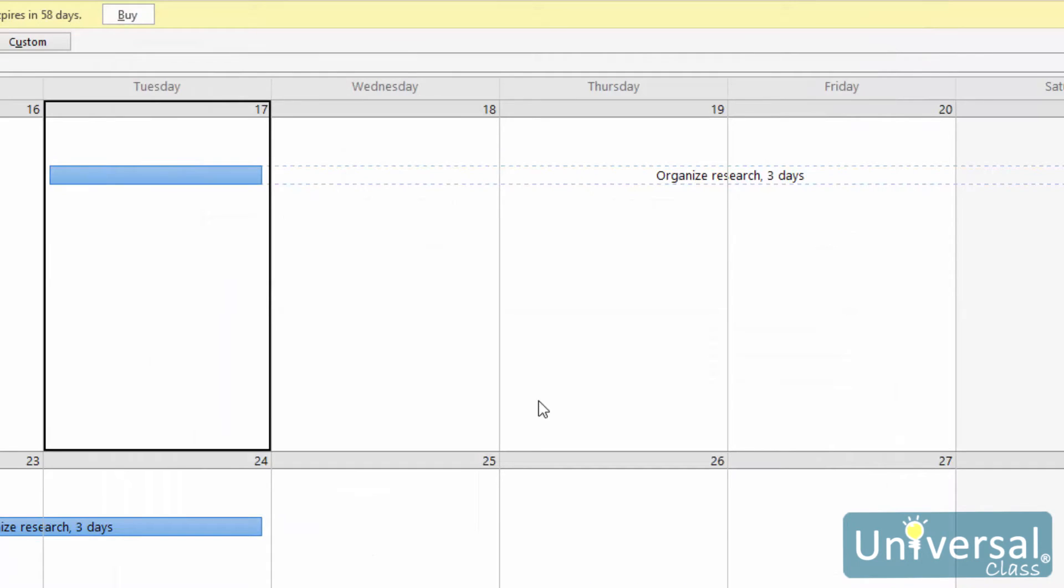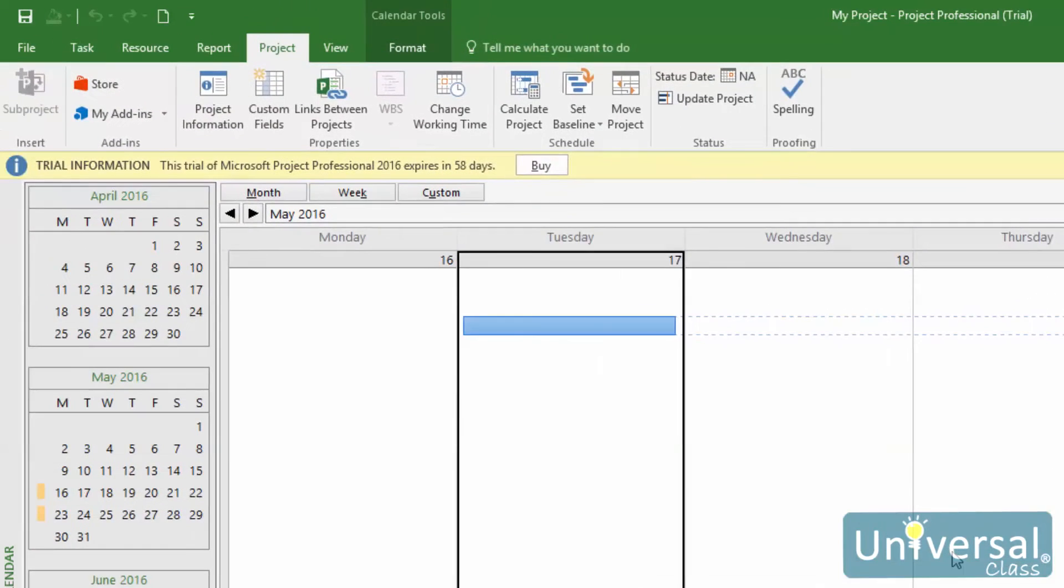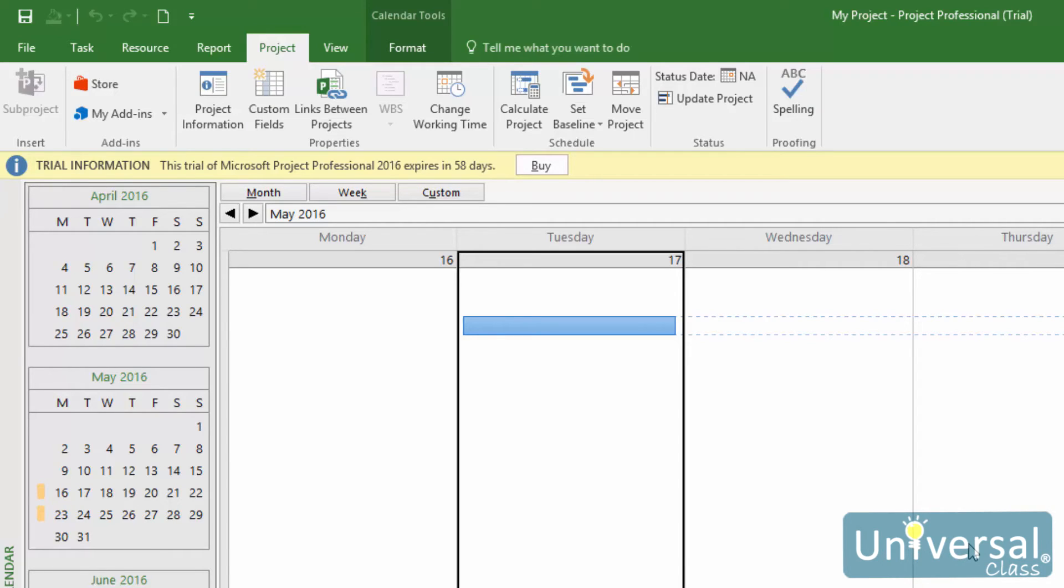If you want, you can make it so a task calendar uses a different base calendar than the one you choose for your project. When you do this, the task calendar that you will use will overrule the base calendar for that particular task. For example, if you choose the standard calendar for your project, but a 24 hour task calendar, a task duration of one day would be 24 hours instead of one work day.